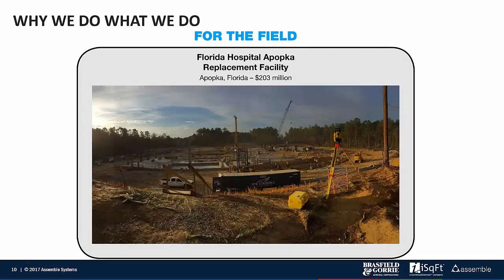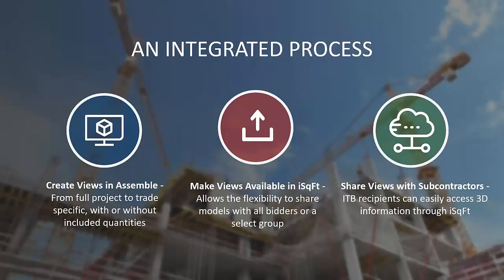We really want to make the VDC involvement an all-encompassing process and ensure that our construction team gets the benefit of the technology. On the Florida Hospital Apopka replacement facility, we applied the model in a self-perform way and also utilized the model coupled with robotic layout to create more accurate layout and a better as-built information model for our owner. That's really the drive behind the Assemble and iSquareFoot integration — being able to take models from the design firm, load them into Assemble to condition and organize the information, and then create specific views to attach to a project in iSquareFoot, accessible by subs right next to drawings and specs with a very minimal learning curve.